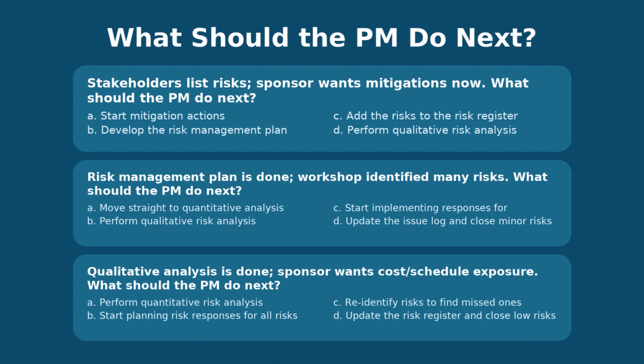This is exactly when you go quantitative, when stakeholders want numerical exposure. What is the total project risk? What contingency do we need? Quantitative techniques like EMV, Monte Carlo, and decision tree give the sponsor the "how much" answer.